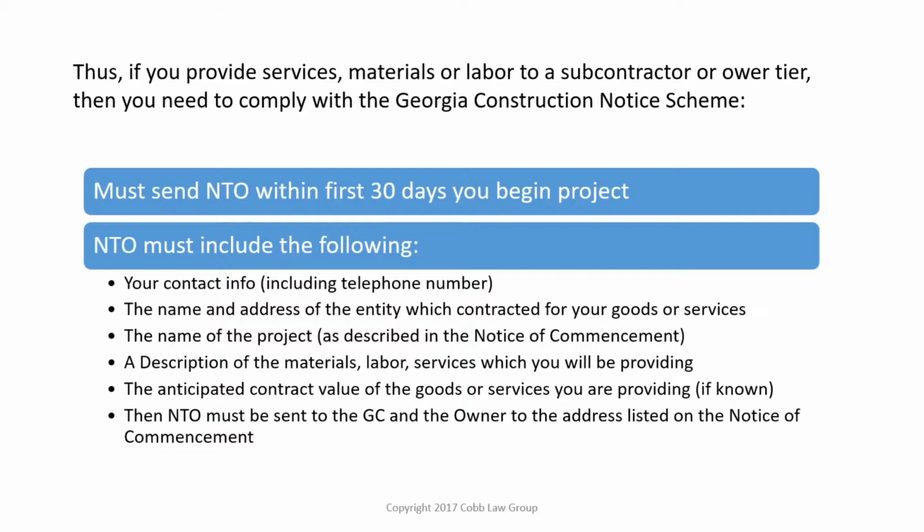And then finally, the notice to owner must be sent to the GC and to the owner to their addresses as they listed in the notice of commencement. So again, you need to have that notice of commencement in hand in order to do this.